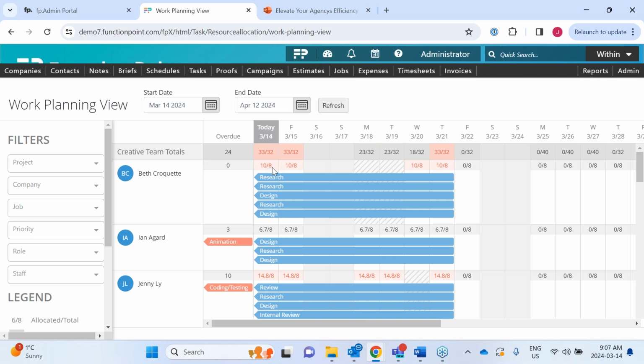Let's talk a little bit about what these hours represent. So this 8 here is saying to us that out of an 8-hour day, how much of their time do we expect them to work on billable work? Let's take into consideration that very rarely is any staff member's full day billable work. There are internal meetings they have to attend, admin work, anything like that. But we really want to be able to task as much of their time as billable as possible.